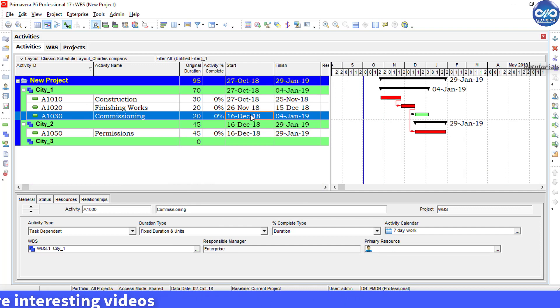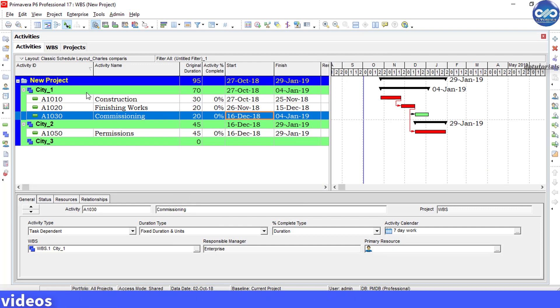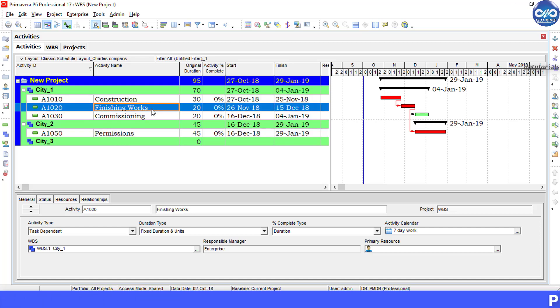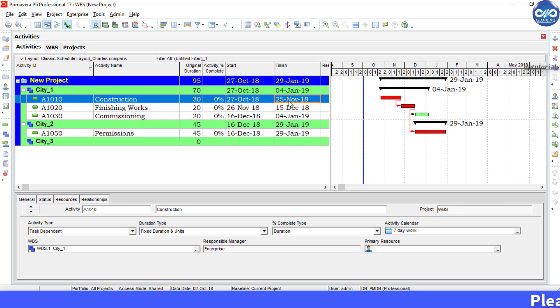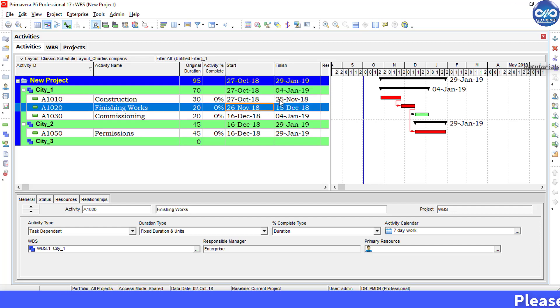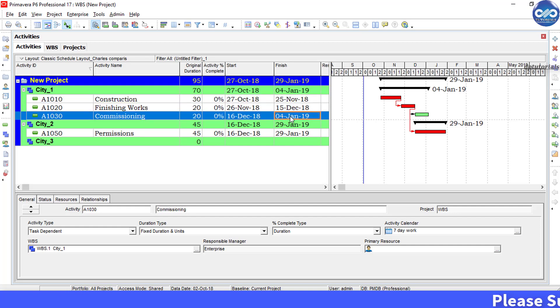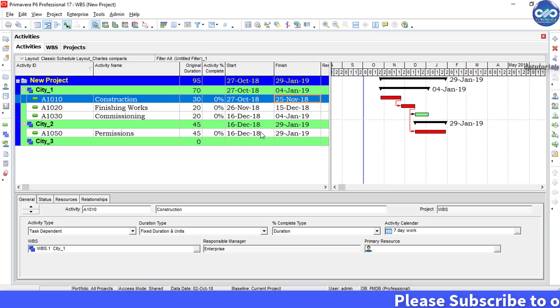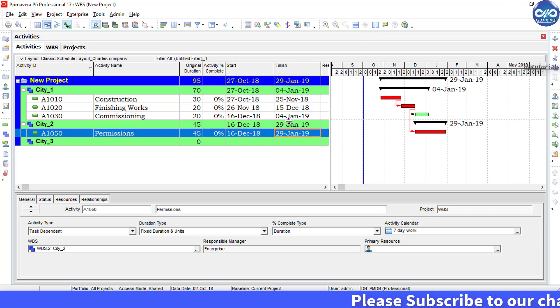It will be showing only city 1 and 2 because these WBS are having the activities which are starting or finishing within 2 months. Now if you keenly observe your WBS summaries, this will be showing the wrong information which is not exactly the WBS.